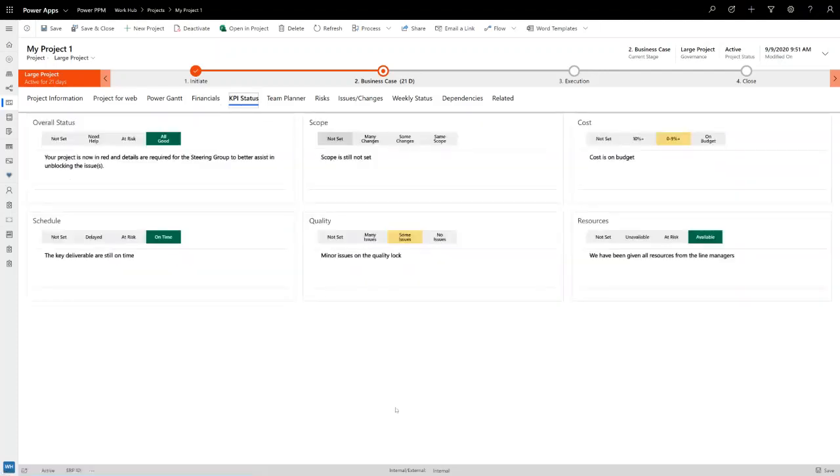Now, for the KPIs, that's also something we always have to do. So here we also have a special component that allows us, as project managers, to quickly understand in text what it means to be red, green, or yellow on scope, for instance. So rather than always saying, are you in red, green, or yellow, we have to know what yellow or red means. We also have to snapshot the data, I think, so that we actually consider putting something in red as a request for help rather than us failing as a project manager.